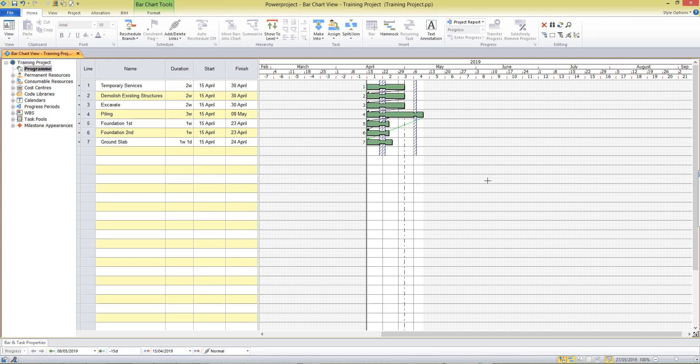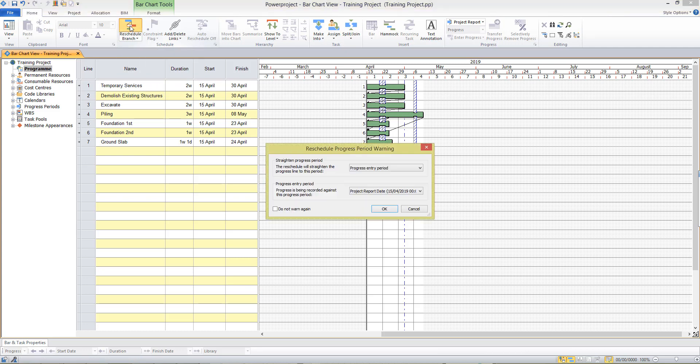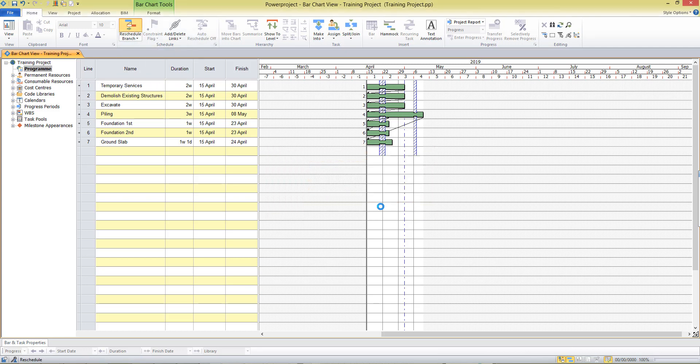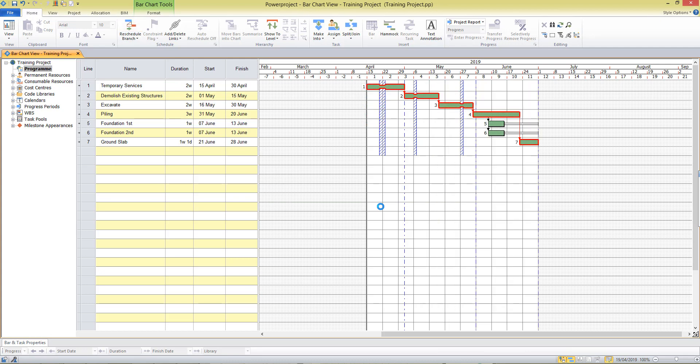When my links are all entered I can press the reschedule button and that will give us a critical path running through our project, calculate the dates for us and it's also shown me a couple of tasks with float here.